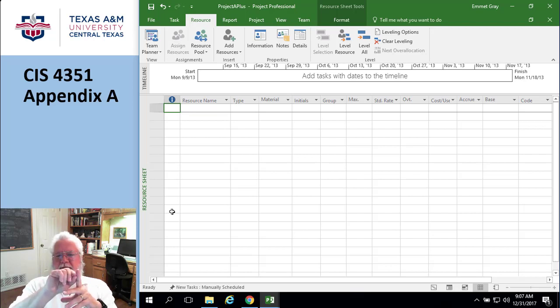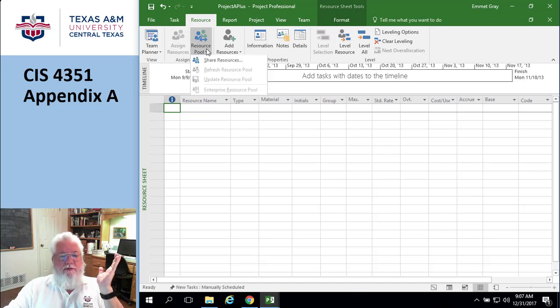So if they had sick leave or annual leave in their calendar, then when I went to grab them as a group, so let's say I had 4 electricians, and I grab those 4 electricians and drop them into my resource pool, then I could get a resource pool of electricians that all work on something, and it would automatically account for the fact that Bob's gone for 2 weeks, okay? It automatically figures that out.